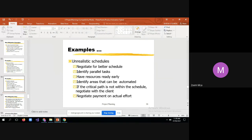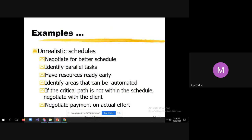Identify parallel tasks — many times you can do certain things in parallel. For example, during automation testing, while writing the automation code, linking test data with an Excel file, and then running the script (which takes a lot of time), instead of sitting idle you can do some other meaningful task in parallel. Also, have resources ready early so you can start everything on time.